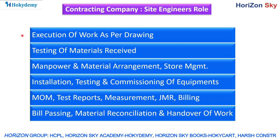The next responsibility is testing of materials received. This is mainly done on the civil side — tests like rebar tests — and for electrical engineers, materials like cables are verified. The site engineer's role is to test the quality of materials received and confirm they match the given specifications.